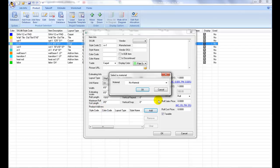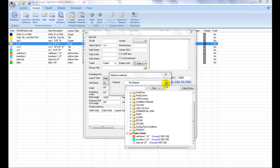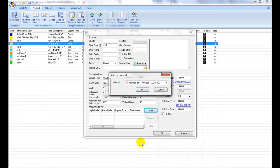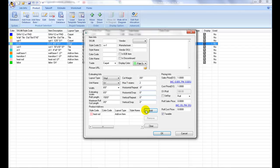Upon the pop-up window, navigate to find the heat weld, select it and click OK. You will see that the heat welding is listed in the product add-on tabs. Click OK again. In this way, wherever the sheet vinyl goes, the heat rod will get applied as well.